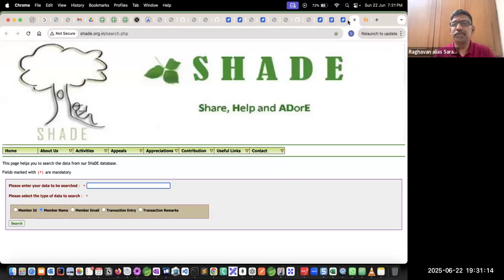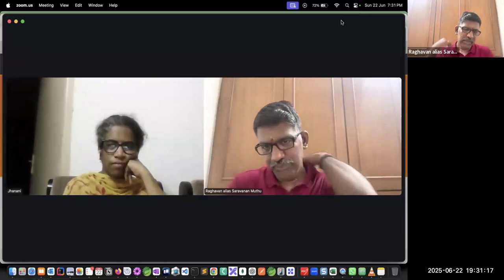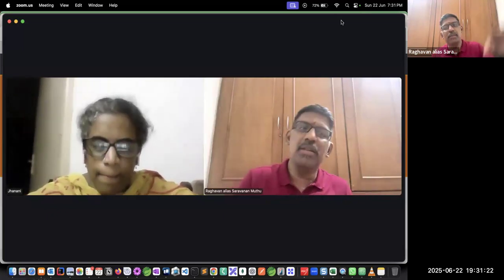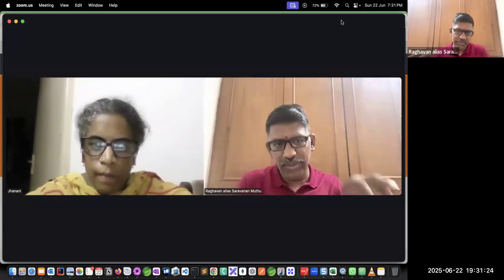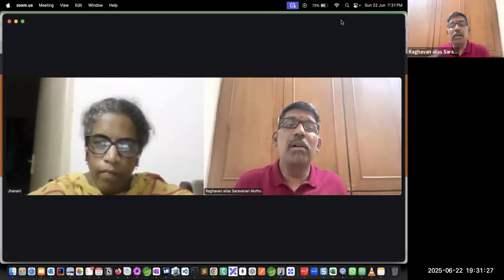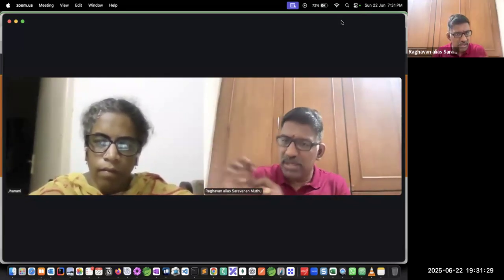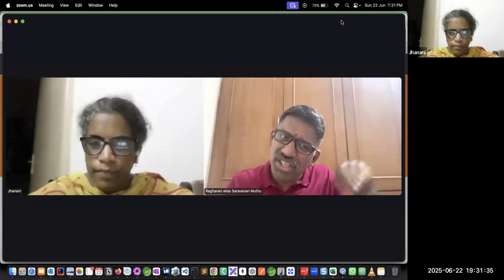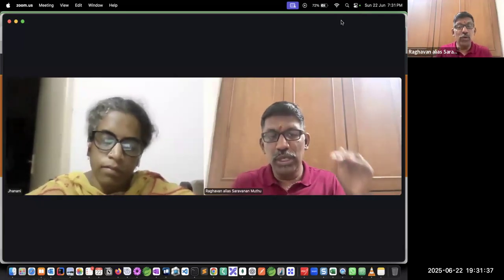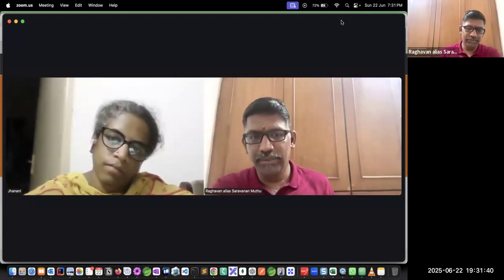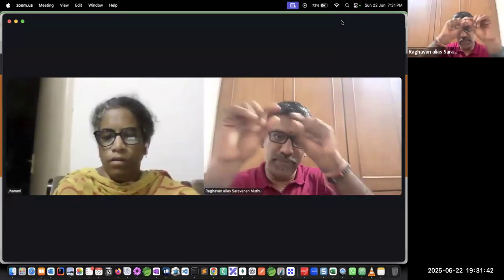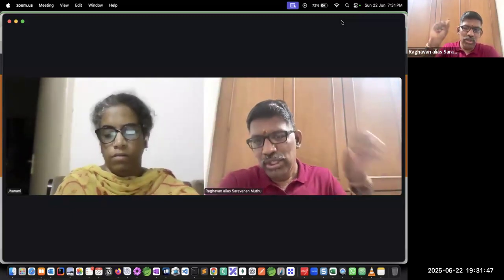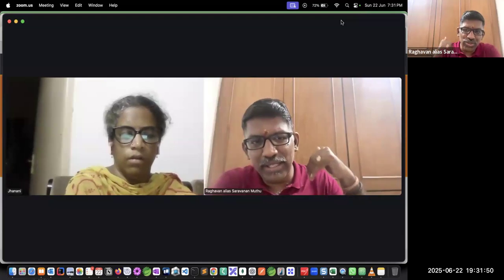Anything else, Janani, for now? No, I think we did the grooming. It was helpful. Probably next week, we may start 2 things. One, create a Confluence page and list down the requirements. Accordingly, we can take a reference from the Jiras or create a fresh Jira. It's okay, create a fresh Jira in the next-gen project. 1, 2, 3, 4 mapped under a story. Create one story for that user, and inside it we create tasks. Story is a deliverable, what exactly the user wants to perform.